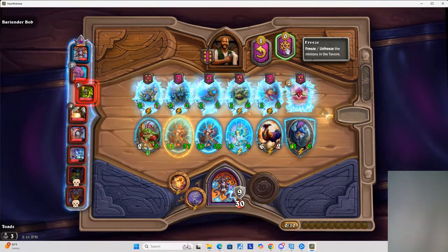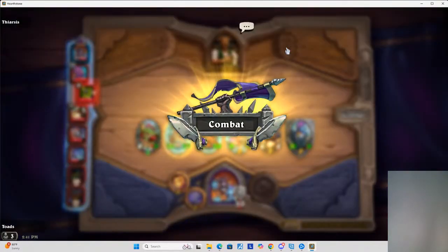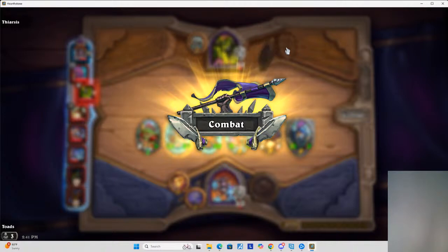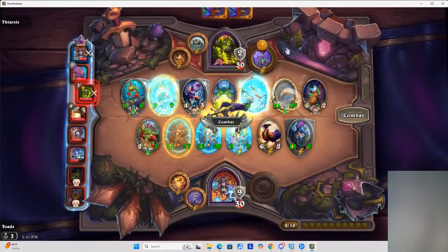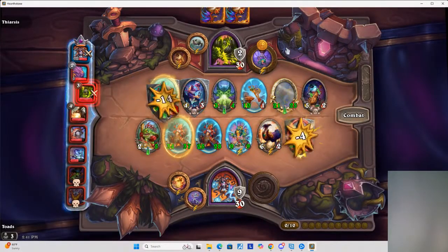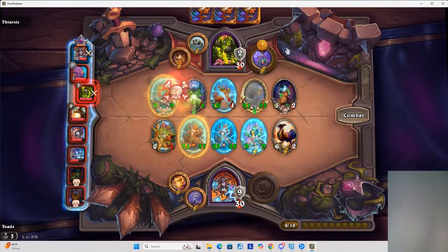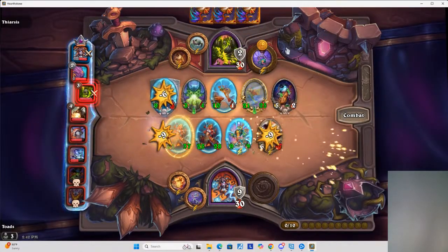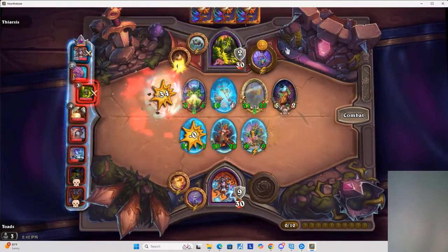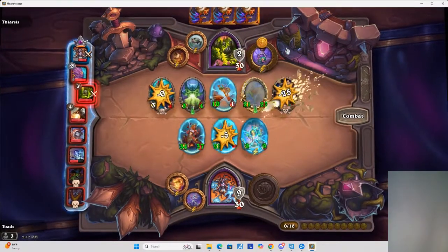That gap in the scope introduced a few additional weeks to the schedule and increased the project cost. After all the discrepancies are sorted out, it's time to get approval of the definition in writing. People have a way of forgetting what they agreed to. A written sign-off can act as a reminder.